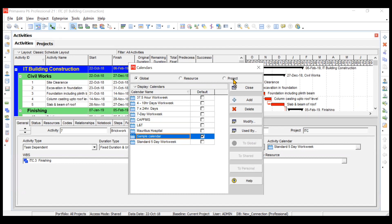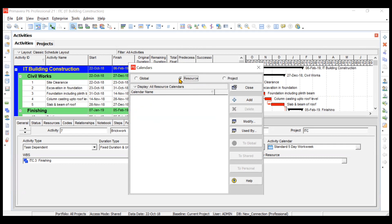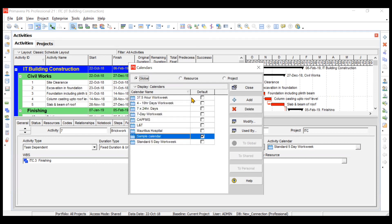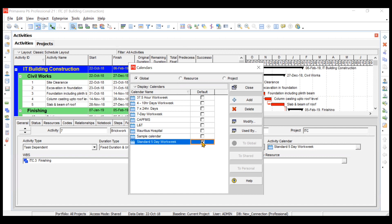Project calendars are only restricted to the specific project they were created for. For example, if I create a project calendar for this IT Building Construction project, it won't be available in a new Residential Complex Construction project. Resource calendars are restricted to your resources — labor, materials, or plants. We will create a global calendar, starting from the standard five-day work week as a base.